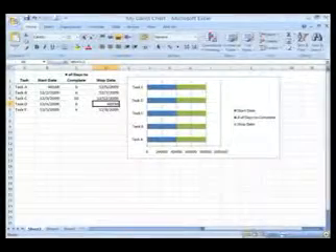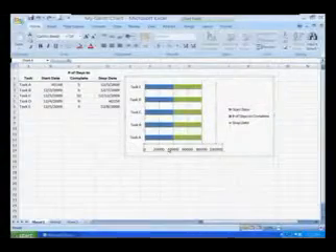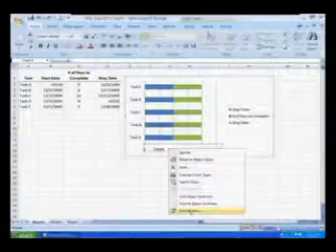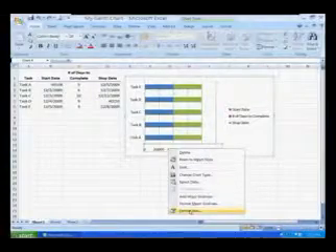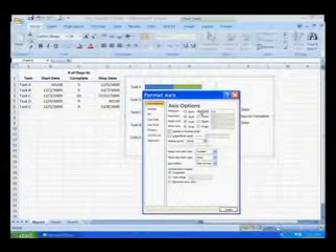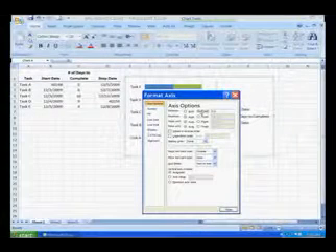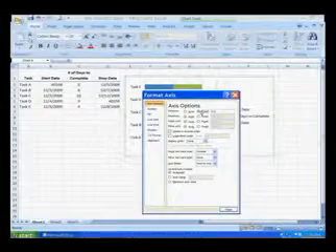We're ready to adjust the x-axis. Click on the numbers along the bottom to select the x-axis. An outline shows it selected. Right-click on it to open the menu, and then click Format Axis. Under Axis Options, next to Minimum, click inside the tiny circle next to Fixed. In the box next to it, enter the earliest start date in its general format, which is 40148.